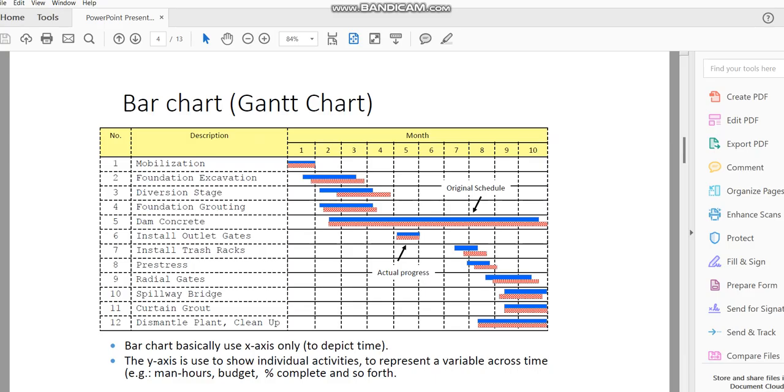So that would be the weightage of your activities. I mean, usually we'll just divide it equally. You're supposed to do 25, 25, 25, 25% for that 100 cubic meters over 4 months, for example. Or like I said, you can spread it out differently. So that's how you calculate your tracking Gantt.